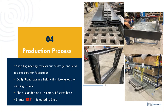The shop is loaded on a first-come, first-serve basis, which is why it's critical to provide all details upfront. If information is missing, the order returns to drafting and the clock starts over from the beginning. Once everything is correct and the order hits the shop floor, it flows through smoothly on a first-come, first-serve basis.